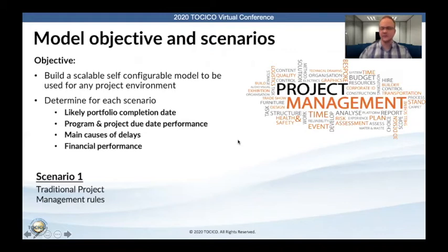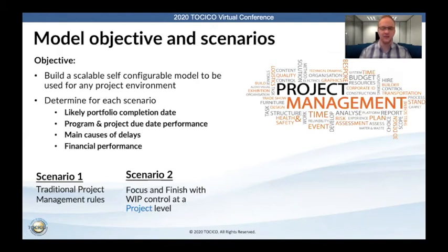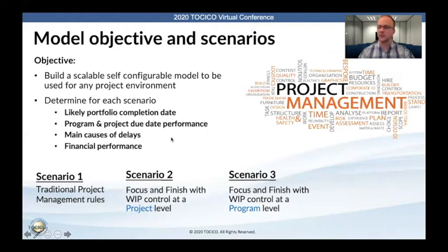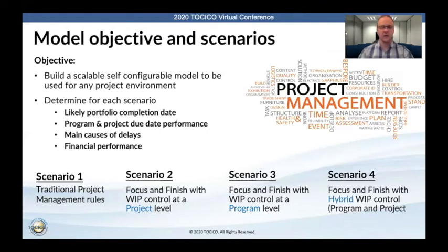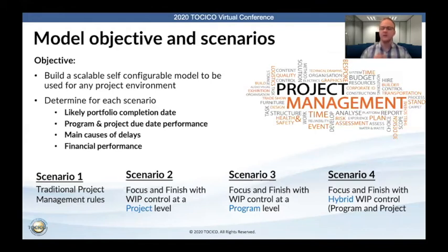The first scenario was going to be the traditional project management rules, which causes the three main decision mistakes that Alan covered previously. The second scenario was a focus and finish scenario that prevents multitasking, with WIP control at the project level. The third scenario was also to prevent multitasking, but this time controlling WIP at a program level. The fourth scenario was a hybrid rule where we limit WIP at a program level but also monitor the backlog in front of critical resources — as soon as that backlog gets too low and there's a risk of starving those critical resources, the rule detects this, overrides your WIP control limit, and releases another program that requires those critical resources to ensure you don't waste their capacity.